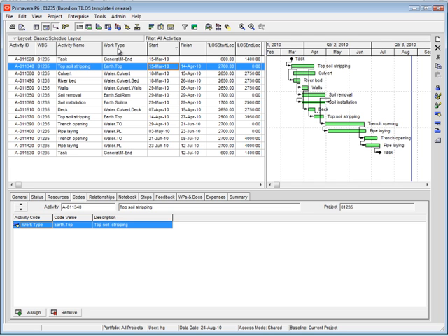TILOS link creates automatically a code library inside Primavera. In our case, we have used the standard or the enterprise code library work type, which contains already a list of different work types, so TILOS can map its activities to these work types.